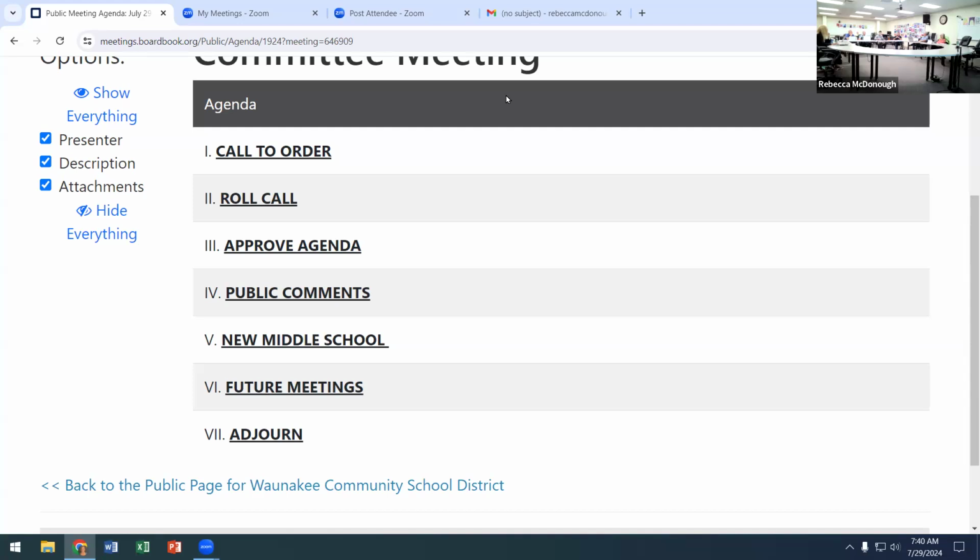The change order that they submitted, I think, was a good change order. Talked to Adam about what we normally expect for pricing on that, and I believe their pricing is about 20% lower than I normally expect, but it's still a big, significant chunk of something that we just didn't find during those original surveys. It's difficult material to find. I have some pictures that I could share. I don't have those, they're loaded up on my phone, but it kind of shows what the gym ceiling looked like and what we found in the areas. But essentially, it was an asbestos containing material on the gym that had been partially removed somewhere 20-30 years ago and covered up in new building materials.